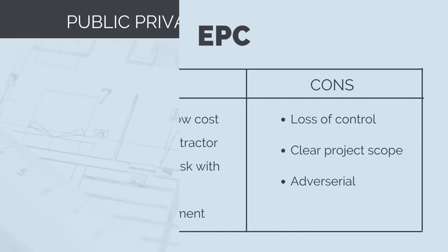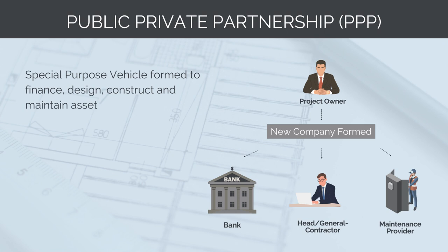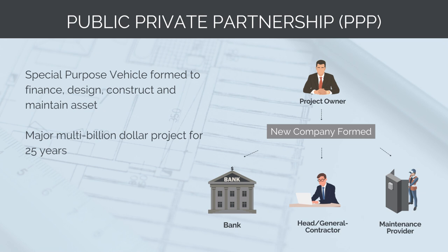The final contract model is the public-private partnership, or PPP. This is a special form of contract where the project owner outsources the finance, design, construction and maintenance. A contractor forms a team with a bank, design consultant and maintenance contractor, and bids to deliver the project. The project owner then pays a fixed fee per year across a period of usually around 25 years. Under this form of contract, the highest level of risk and responsibility is outsourced. PPPs are only used for multi-billion dollar projects with government bodies — examples include the Melbourne Metro Tunnel or Peninsula Link Freeway in Australia.